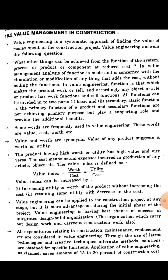The value index can be increased by increasing the utility of a product without increasing the cost, or by retaining the same utility while decreasing cost. Value engineering can be applied to a construction project at any stage, but it is most advantageous during the initial phase, where it has the best chance of success. If value engineering is applied, it is claimed that savings of 10 to 20 percent of the project cost can be achieved.